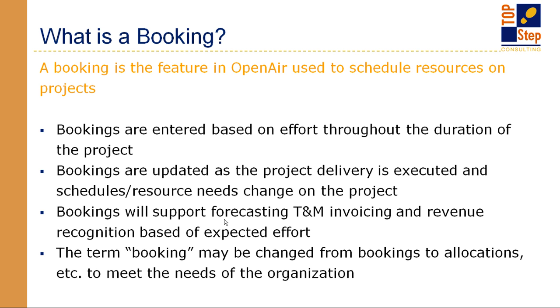The term booking, as I mentioned, may be changed. And you really want to manage your bookings in order to get good data and good forecasting. You really want to manage your bookings as your project moves and changes, because as we all know, as a project goes on, you may have assumed you were working 40 hours in 1 week, and you may have only worked 10. So if you still need those hours, you want to push them forward.